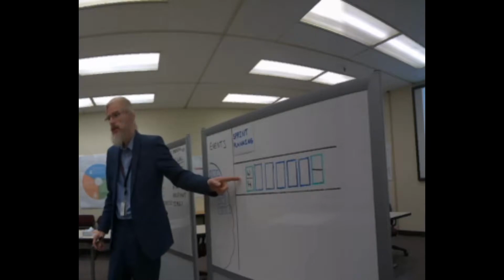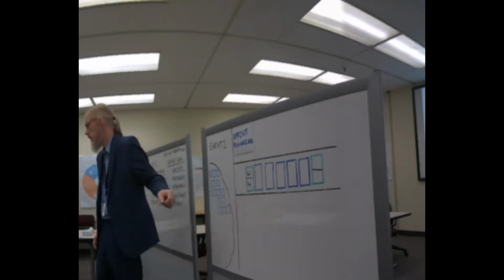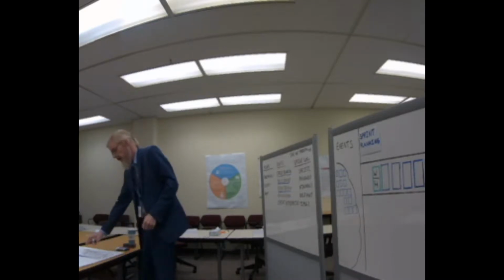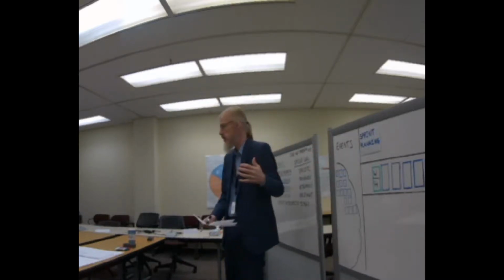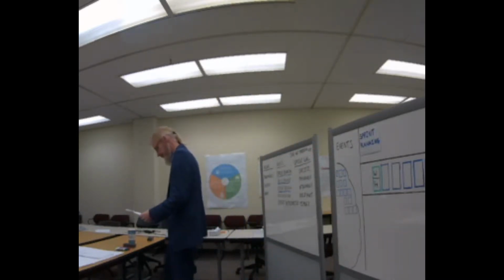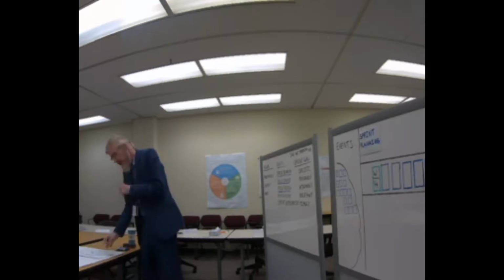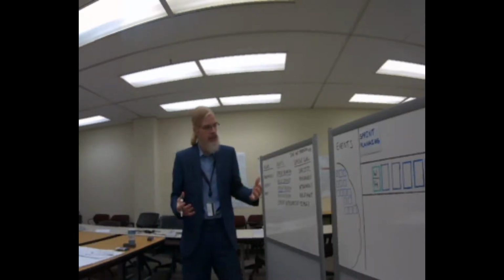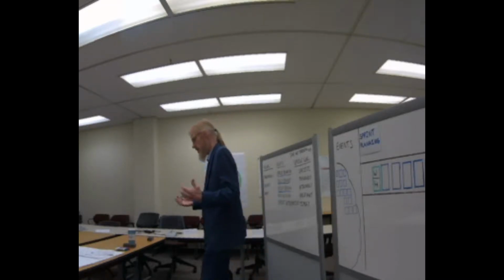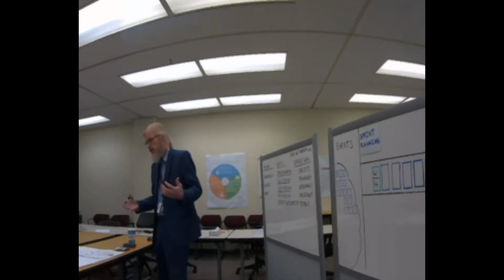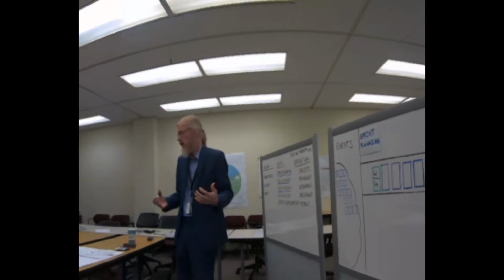If you were to guess, who do you think owns the what part? Product owner. Product owner, yep. Product owner is all about what. They are what features should be next, what are the highest priority features, they're all about what. So the what portion is broken into, well, there are two deliverables that are expected of the what portion. And the first is to declare a sprint goal, okay?